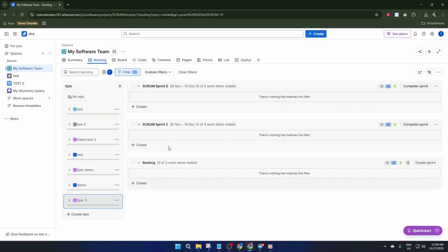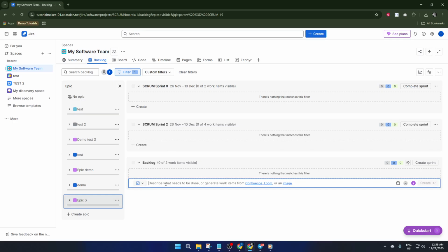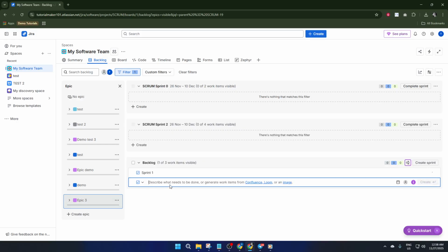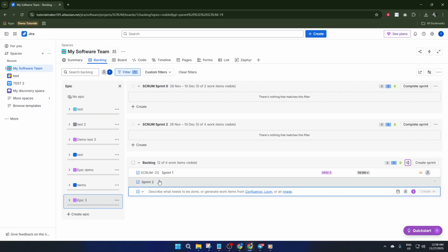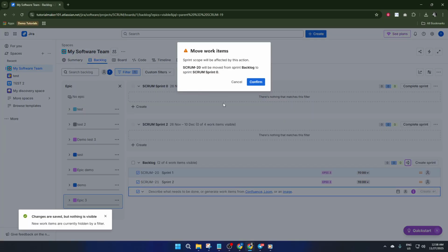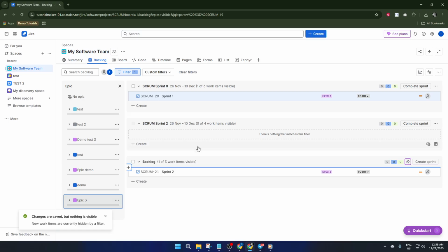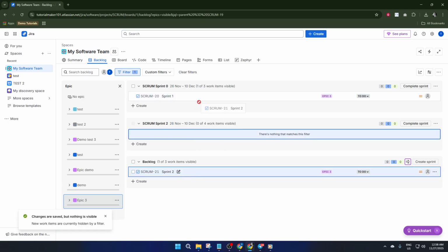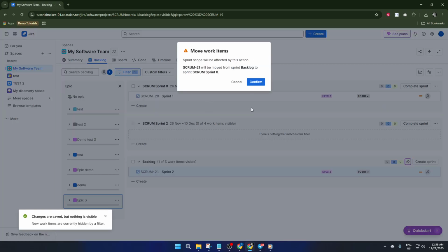Now, once your work items are organized, it's time to plan and start a sprint. Usually, this is led by a Scrum Master who will set the sprint's duration, typically 1 or 2 weeks, and assemble a batch of stories that need tackling. Before the sprint officially begins, you as a developer should add your planned tasks to the right stories. Take a moment here to review what's been scoped for the sprint and add in anything else you'll need to do, like tests or documentation. Planning upfront sets expectations and makes sure you're not blindsided by missing pieces later.